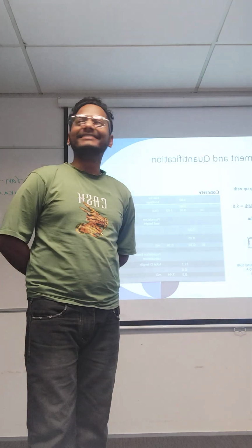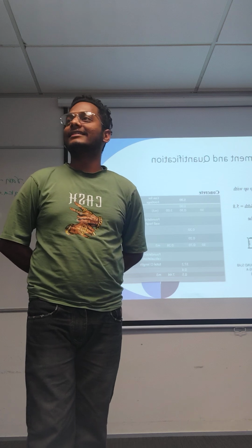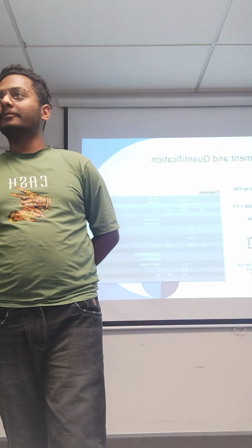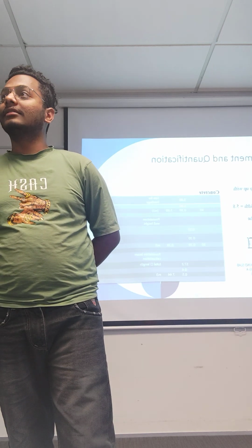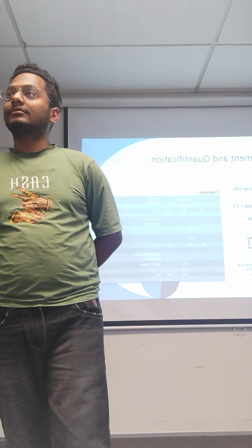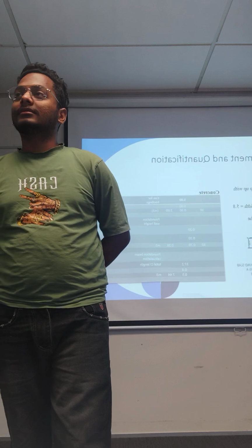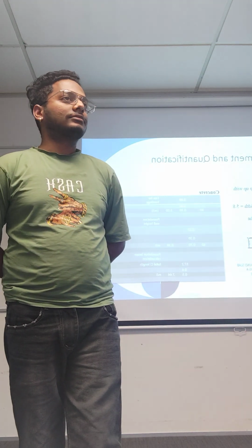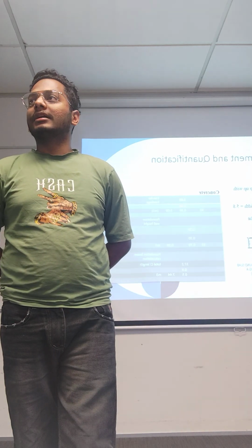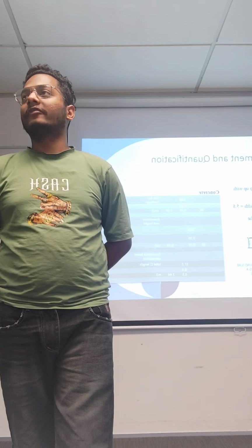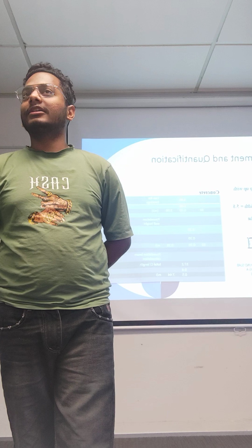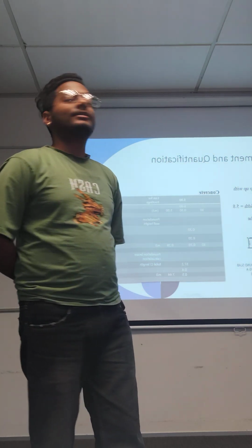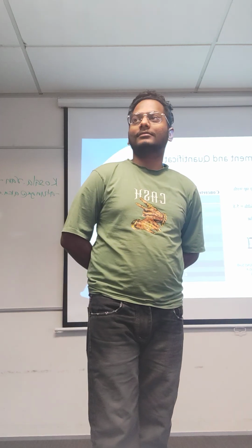How are we going to build up the rate? What is the procedure? Length into breadth, that's the quantification. I'm asking how we build up the rates. Rate build-up procedure. What are the components? Material, labor, and overhead profit. What else? Material, labor, overhead profit, and plant. That's all.